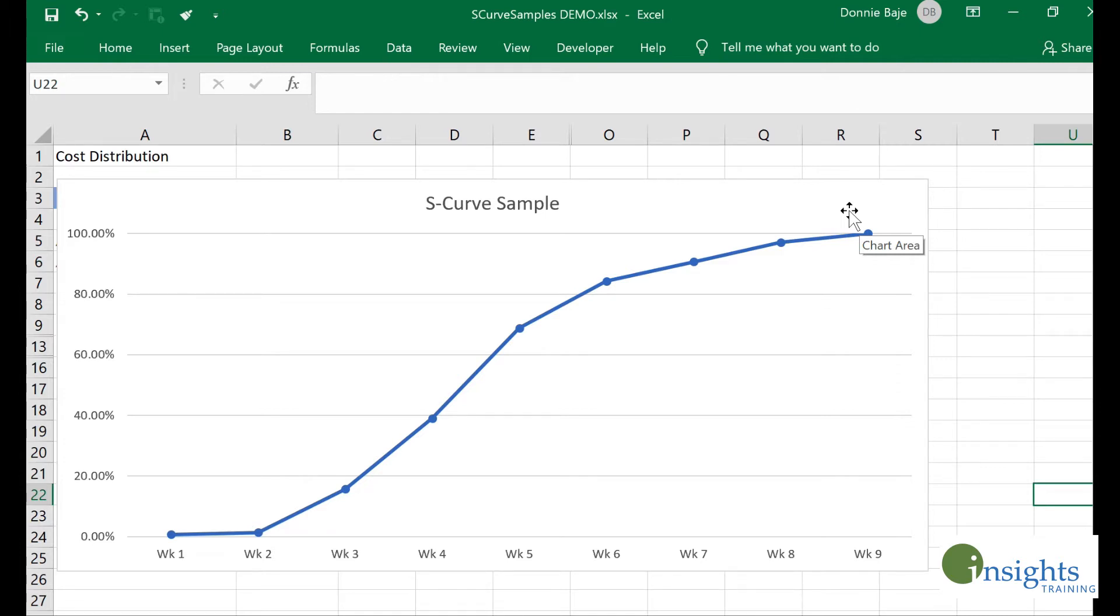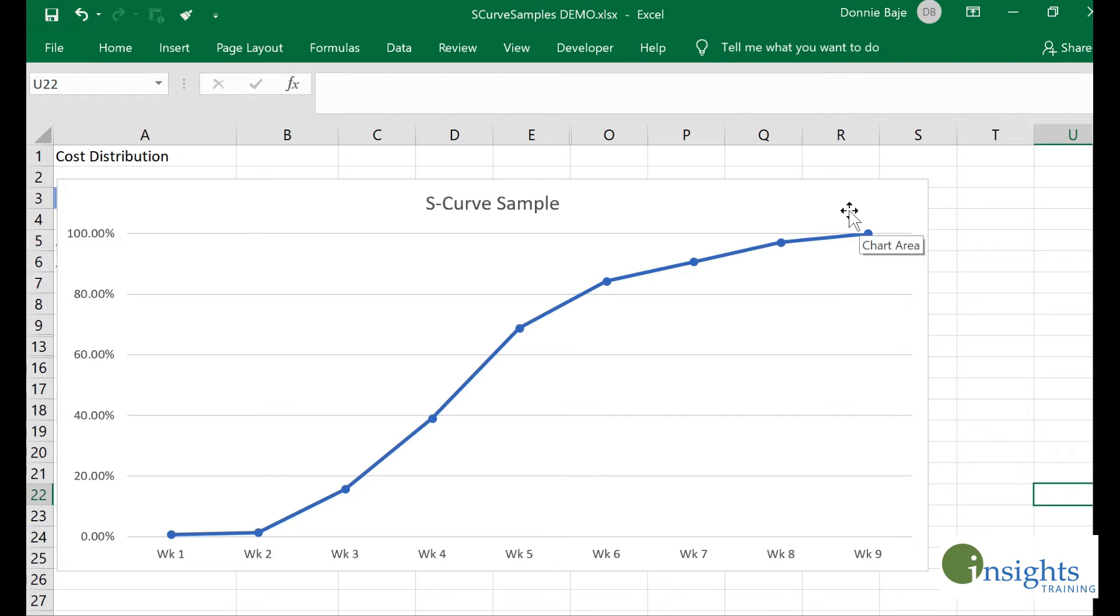It tells me how fast or how gradual costs or man hours are being used by the project. If we create a very steep S-curve, it means the cost or man hours are being used immediately or very fast. This one is very gradual, very well distributed.